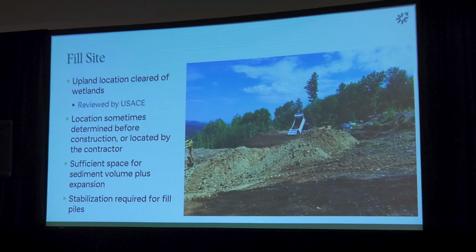So with our fill sites, there's a lot of stuff that can come up. First off, this is one where we found this fill site and we got it approved, and it turned out it was winter, so we had a stipulation that we needed to do a wetland delineation in the spring. That came, and the wetland was bigger than we thought, so the fill site wound up being smaller than we thought, and we had to do some pivoting and figure out where that additional fill could go, whether it was acceptable for the invasive species, and what the management wound up being here.